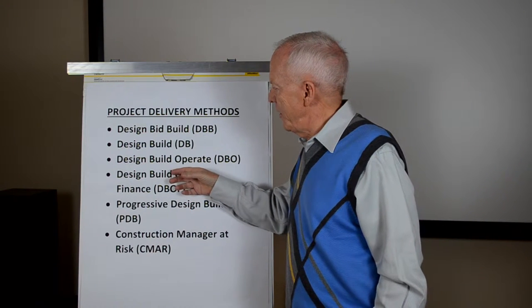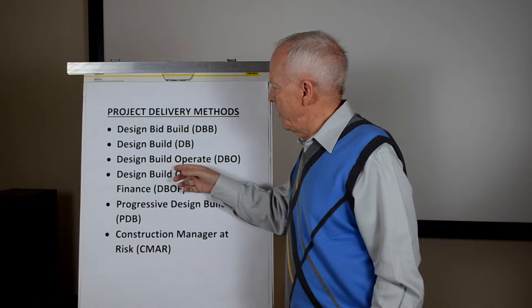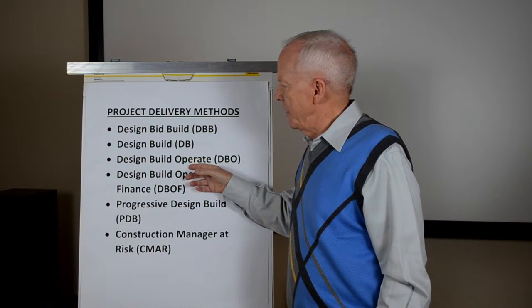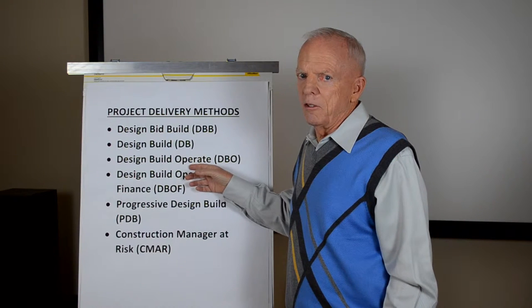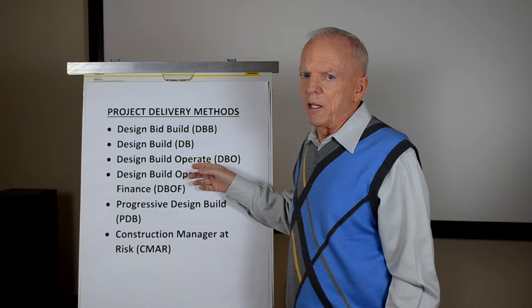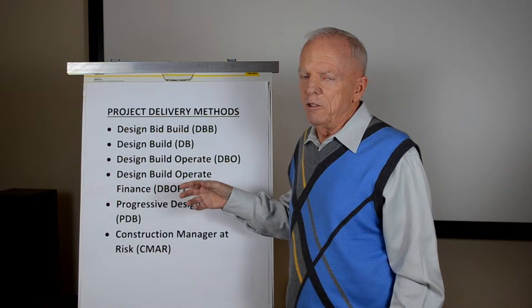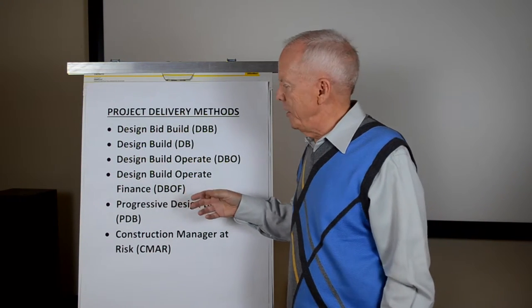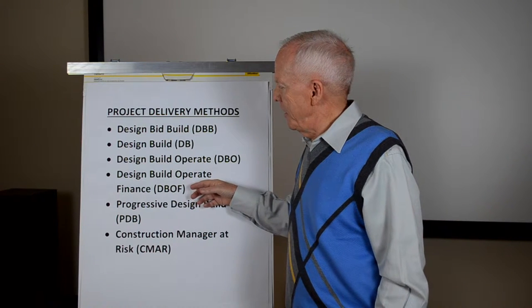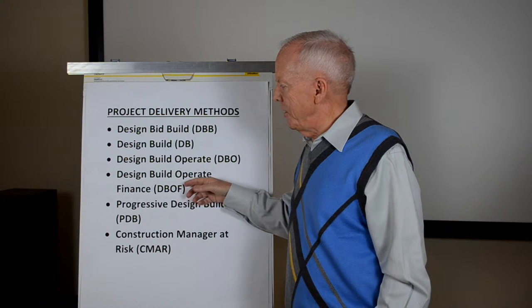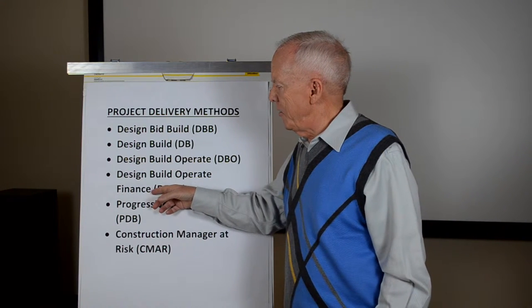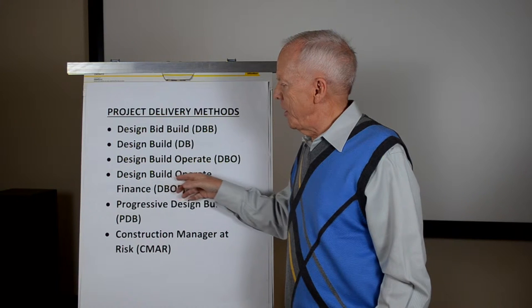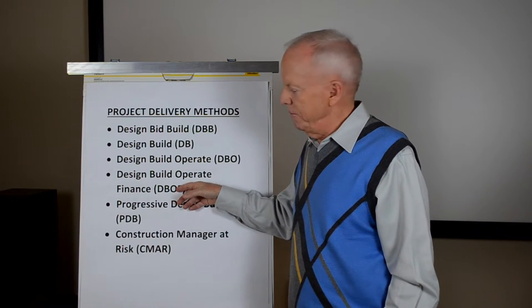In a variation of that — design-build-operate — the contract with a single entity also includes operation of the project for a long period, usually 15 to 20 years. Another variation: the single entity also provides financing, so they design, build, operate, and finance the project.